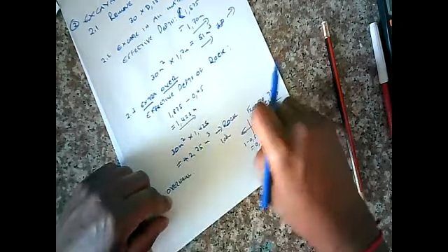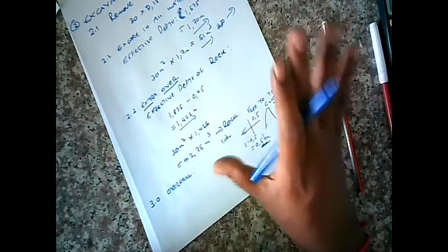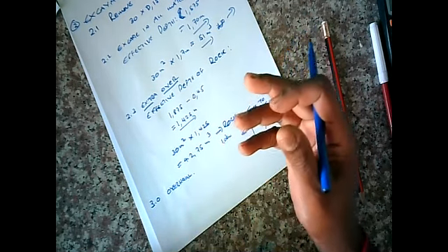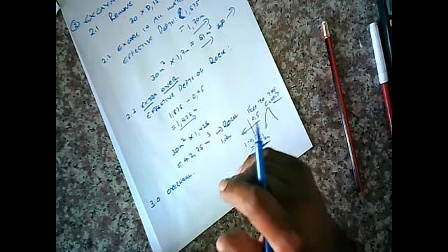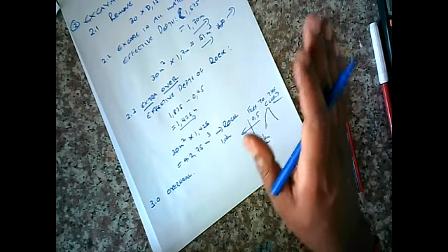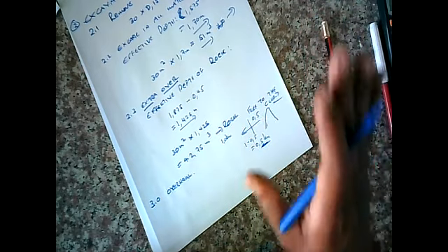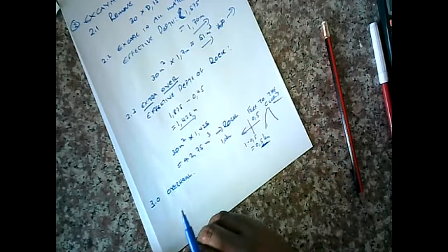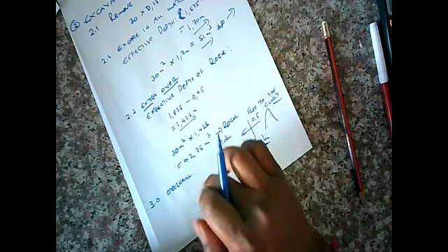It is a combination of freehaul to form a new value of the haul distance. Basically, how much is the contractor going to haul in terms of distance? It's anything minus half a kilometer, or 500 meters. That's what it is.